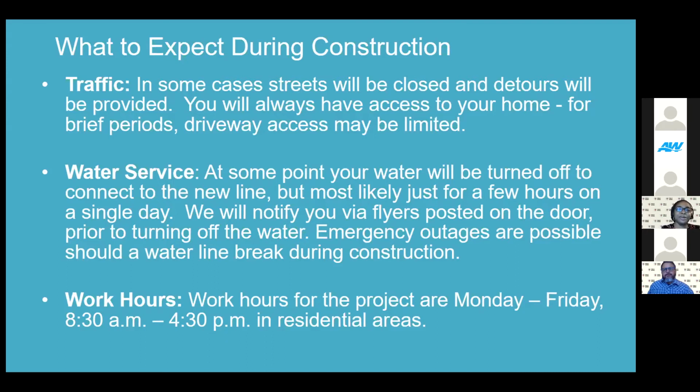The work hours for the project are Monday through Friday, 8:30 a.m. through 4:30 p.m. in residential areas. And along the US 290 portion of the project, it's from 9 a.m. until 4 p.m. Monday through Friday, but some weekend work may take place.